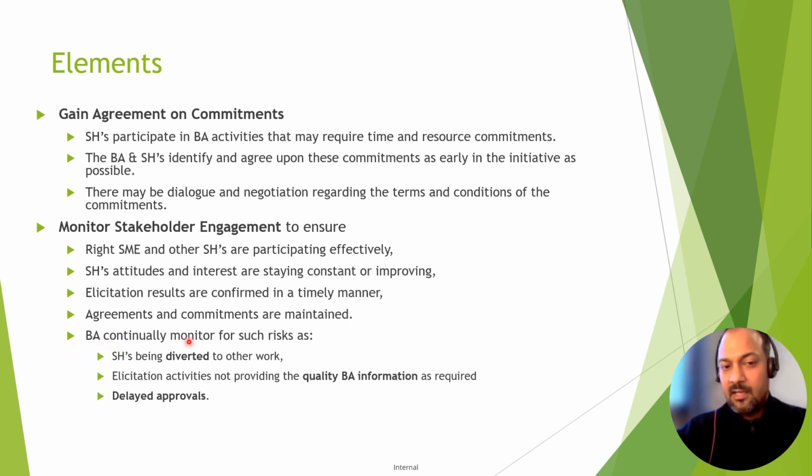The BA continually monitors for such risks as stakeholders being diverted to other work, elicitation activities not providing the quality business analysis information as required, or delayed approvals. So that's important. Please put it in your notes. Any scenario based question could come out of this.